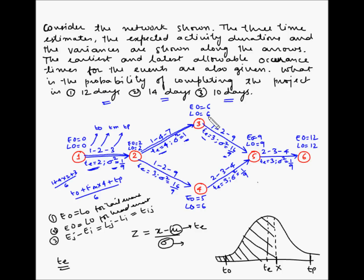For activity 3-5: tail event EO = LO = 6, met. Head event EO = LO = 9, met. EJ minus EI = 9 minus 6 = 3 = Te, so all conditions are met — activity 3-5 is critical. For activity 5-6: tail event EO = LO, head event EO = LO, and EJ minus EI = 12 minus 9 = 3 = LJ minus LI = 3 = Te = 3. All conditions met, so activity 5-6 is also a critical activity.